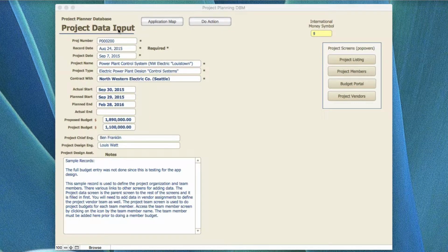For example, I worked in a large corporation that had many build-to-print type items. Build-to-print meant that we did separate specifications for each new build-to-print item, and then we did the design and the drawing tree based on that design from the specifications. Then we picked vendors for the assemblies and sub-assemblies that we were not going to produce, and those systems were sent out to vendors to be produced, and we tracked the cost and delivery and deliverables from those.